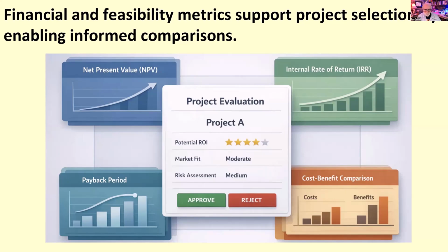So we can calculate net present value on all these and compare them in more current value. The greater the net present value, the more likely the project is feasible economically, but it depends on assumptions about future benefits and costs, which is one of the problems with doing this. You're asking people to forecast.